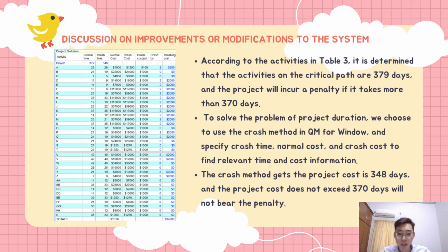Therefore, the crash method gets the project duration to 348 days, and since the project does not exceed 370 days, it will not bear the penalties.